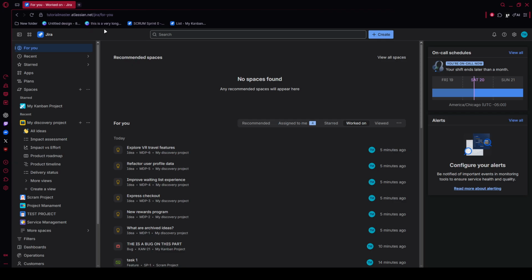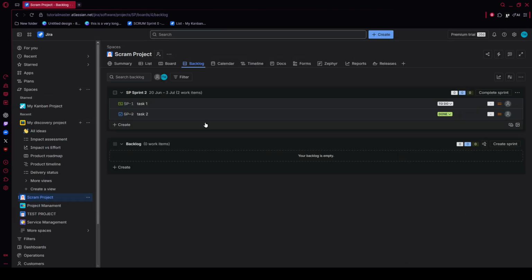To keep things structured and easy for the team to understand, drag and drop your user stories into priority order. Place the most important and highest value item at the top, then continue ranking the rest underneath it. This creates a clear sequence for refinement and helps everyone understand what should be considered first for the next sprint.